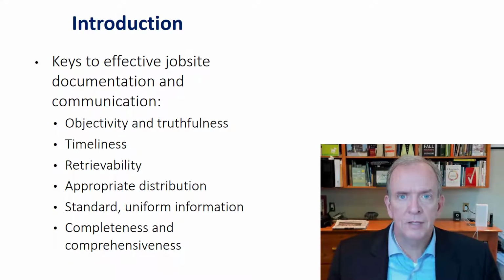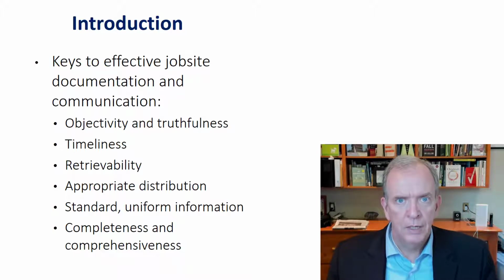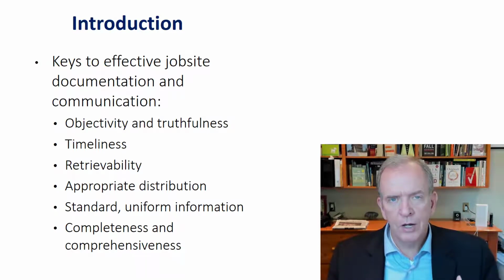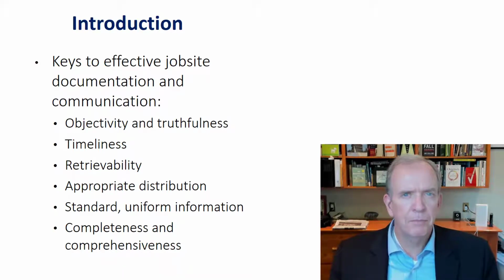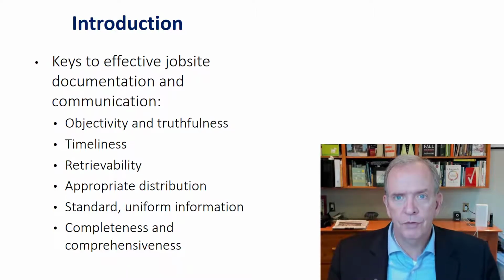Timeliness, too. The best time to collect documentation is as it's occurring, right? In legal terms, we call that contemporaneous documentation. So the documentation as the project is being built. To fabricate documentation later on, even if you're trying to be truthful, becomes more problematic because you can't remember things as clearly as when they are happening. And from a legal perspective, contemporaneous documentation is given the highest validity. Plus, from a management perspective, if there's an issue with something, you want to get on it right now. You don't want to get on it two months after it happened.